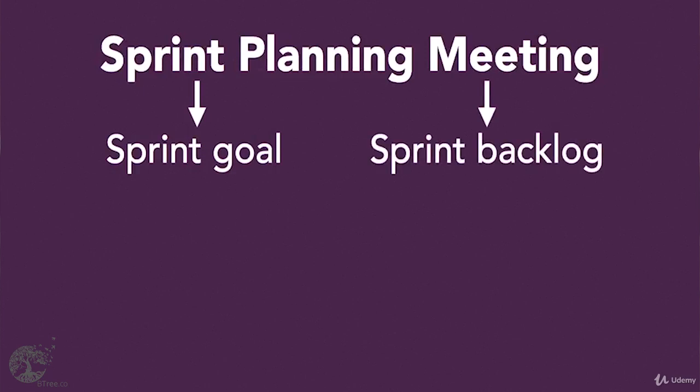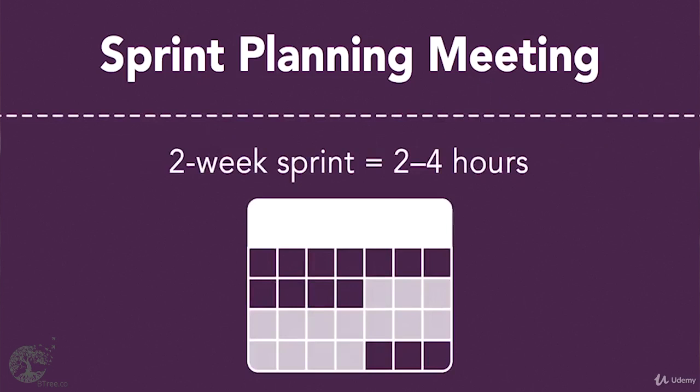The meeting usually lasts around 2 hours for each week of the sprint duration. So if you do 2-week sprints, your sprint planning meeting will typically be 2 to 4 hours.